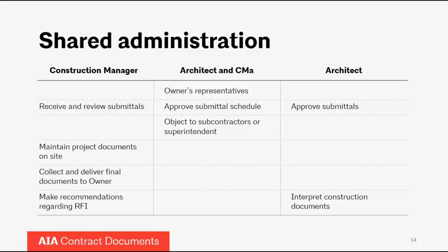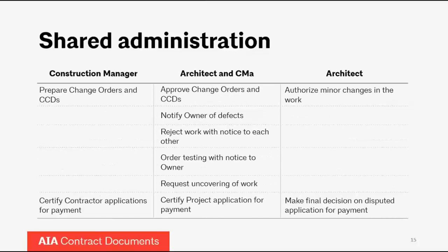The construction manager is going to maintain project documents on site and may collect and deliver the final documents that go to the owner. They may make a first-pass recommendation when a contractor submits a request for information. However, it is the architect and the design team that are going to interpret the contract documents and make a final decision when it comes to requests for information.